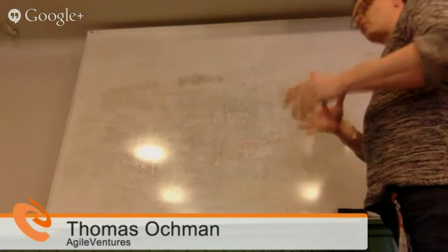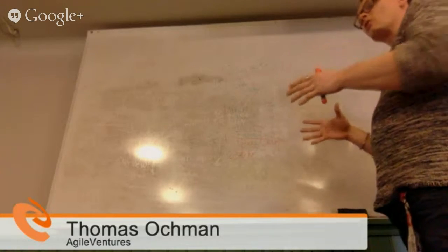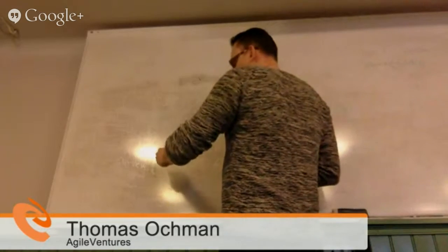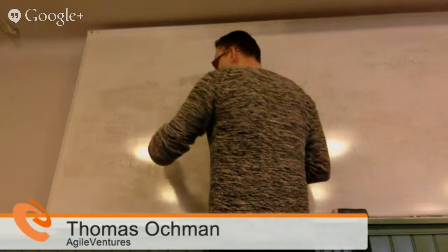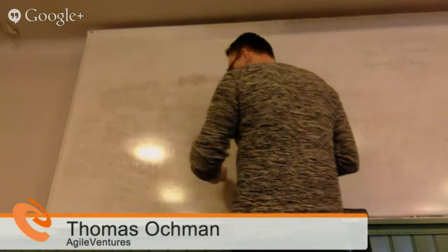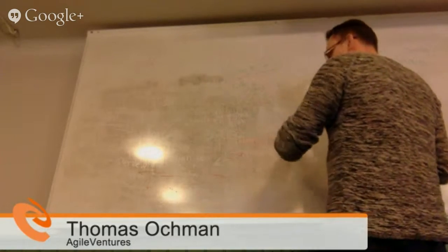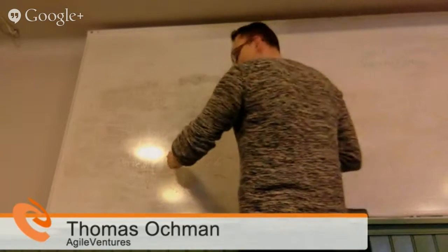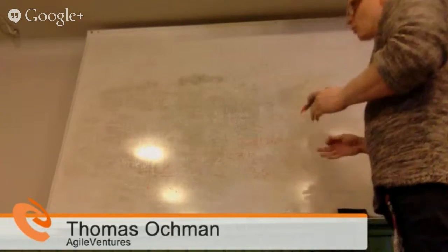So we spot any misunderstandings or mistakes we do at a very early stage, because in a traditional software development method, you give us a requirement on day one, and then we come back 3 months later with something, and that something could be something completely different from what you wanted, because we kind of misunderstood something at an early stage and we took the wrong path. So we don't want to do that.